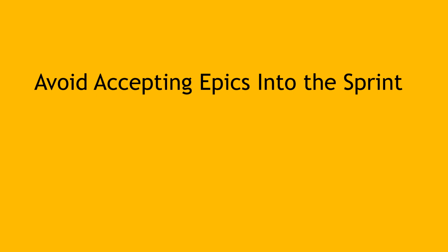So having one big epic instead of a number of bite-sized stories is more likely to lead to a sprint failure. Making your stories smaller will make the sprint goal more achievable and therefore make the team more agile during the iteration. I personally suggest the stories should be decomposed until they are 13 points or less to avoid epic proportions. Each story should be decomposable into tasks that are expected to take between half a day to 2 days to complete.